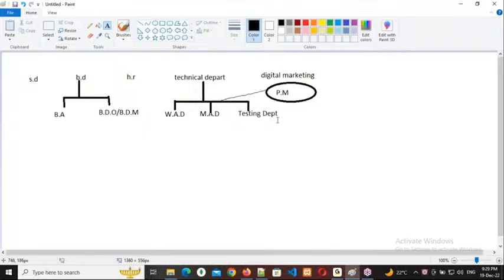Up to here, this is the agenda. And then after what they will do, all those things, they will forward to the sales department. Okay? So they will finalize the price, depending upon the persons they are using, the effort they are keeping, the team size, the requirement, and the calculation and everything.